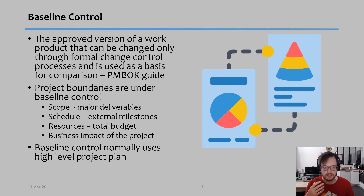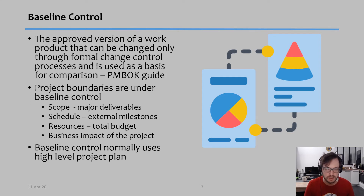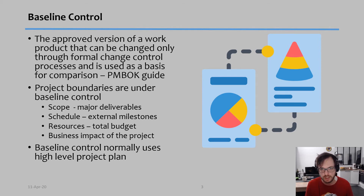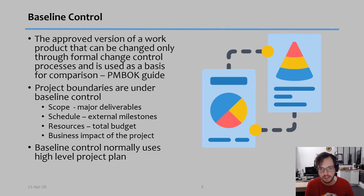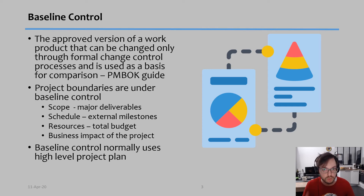Project boundaries are under baseline control, and we're talking about scope, schedule, and resources. This is the plan we're going to be comparing ourselves to during the project, and it also includes the business impact of the project. Baseline control will normally use a very high-level project plan — it makes more sense to compare the work we're doing to the major categories or main objectives of each phase, rather than every single detailed task.